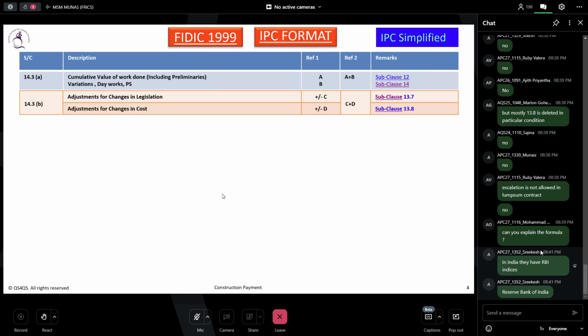If you are an estimator, you might have this kind of indices, because based on those indices you will price your tender. Let's say your project is going to be 2 or 3 years, then you have to have some kind of prediction, whether the prices will go up or down. Mostly construction prices go up, sometimes down, with very little chance. So we can see historically how it is changing. There's a graph, isn't it? Now think about the cement price 10 years back and right now. Definitely that price is higher. You understand? So that is the thing.